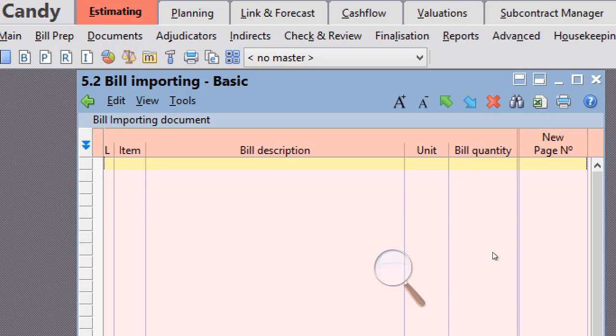They have created what they call documents. For example, when you are doing your estimation, since it is only one Excel sheet with many columns, you only need the columns item number, description, unit, quantity, price, and the amount, right? Yes. Candy then includes only those columns you need in one document and gives them a specific name. So when you need that,